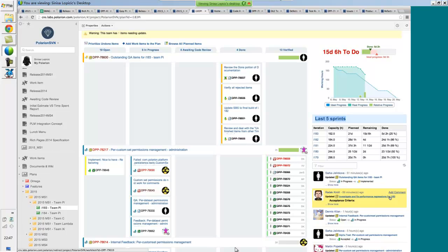So the team is basically sitting in the same room with the product owner and Scrum Master, and they pop each of these items into the sprint plan. And as they do it, we do one more round of estimation before we actually commit to this. So we go to the user stories, we check to understand, for instance, on this one, what is actually required to do. There's acceptance criteria prepared for it.